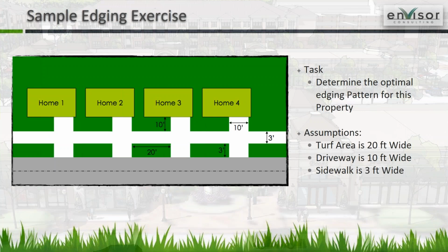There is one other tool that's important, and that's also a map, thinking about on a site plan just how everybody should move around the site. I happened to mention motion waste earlier in this presentation. We walk a lot in the things that we do, sometimes miles and miles a day. So thinking about how people move through a site is also important. And if you have the 2 pieces of a plan, a Gantt chart and a map about how people move, then I think you're well equipped to really optimize productivity and minimize waste.